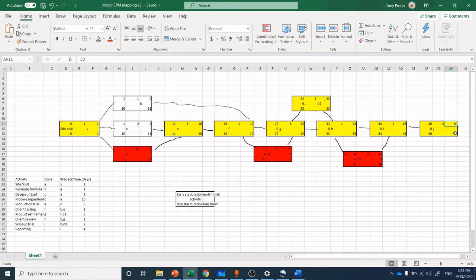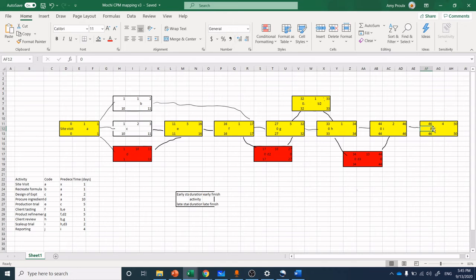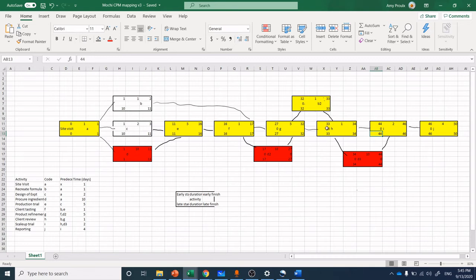Now, we have to do a backwards pass to see where are these activities dependent. So we're going to start with the day here, and we're going to subtract the duration, 4. Now here, we're going to subtract our early start and our late start to see if we have any slack in that time. And in this case, we have no slack in the time. Moving backwards, so we're moving late start into this corner, so late finish. And late start minus duration, 46 minus 2 is 44. So again, we have no slack in there. 44 minus 10 is 34. No slack in there. And we've got 34 moving up here. No slack in there.